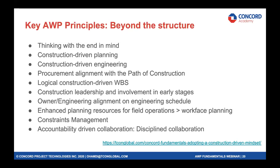The alignment of procurement with the path of construction is a big area to think about — and it varies by company, whether procurement is done by the owner, EPC, or a third party. Your work breakdown structure also needs to be aligned with the logical construction-driven philosophy. You need to align both and adopt one single work breakdown structure for the project.